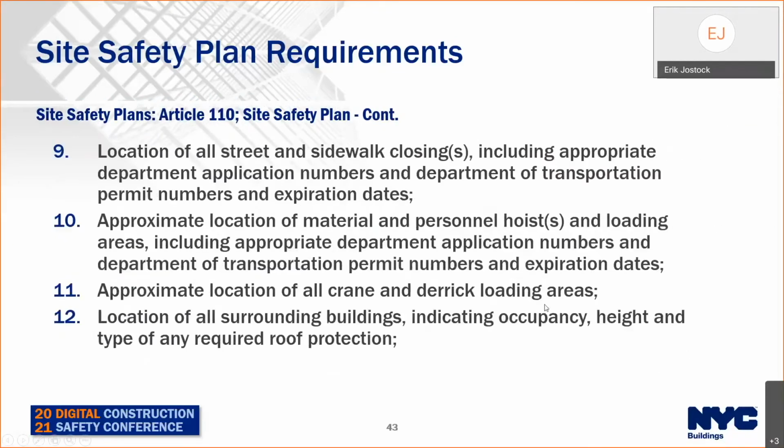Location of all street and sidewalk closings. This is important for the pedestrians, where if you're in the middle of the block, for instance, that you're letting the pedestrians know right away that they can't get down to the full length of that sidewalk and that they should use the other side.